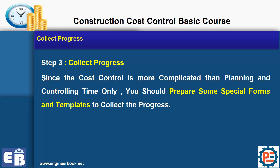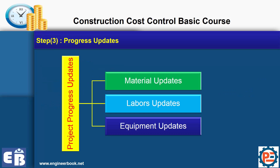I considered the minimum involvement of team members for the cost control in this course. If you start telling your project team you need to perform cost control, they will not be interested until they hear some reports from your side. If you ask for too much information in a complicated way, they might not be very interested in giving you that information. Therefore, I created very simple Excel sheets and forms for collecting information from the site, and then we create other templates to gather all this information together. We created three templates: one for material updates, one for labor updates, and one for equipment updates.